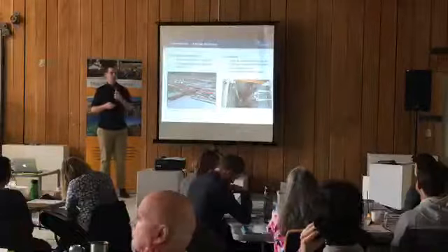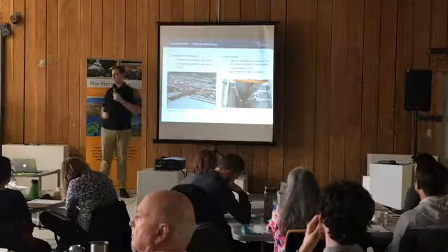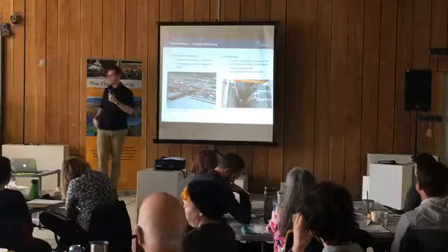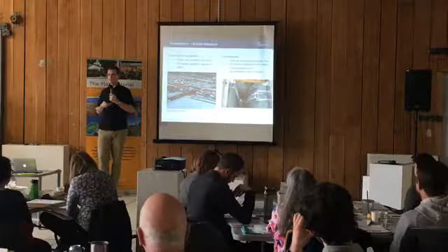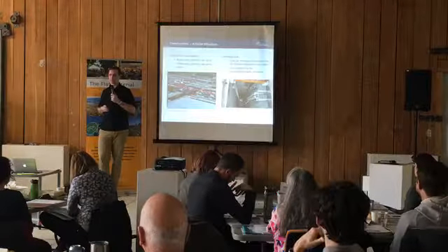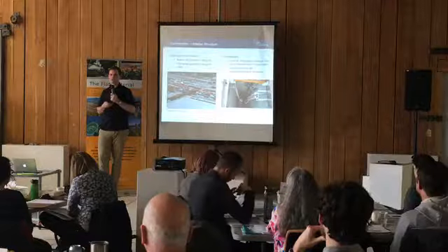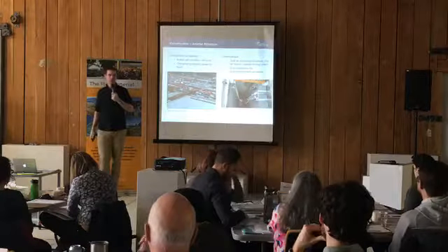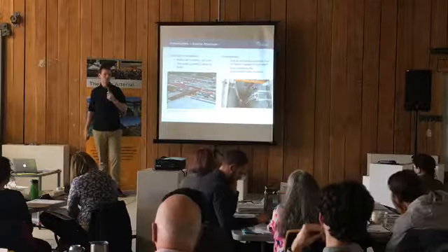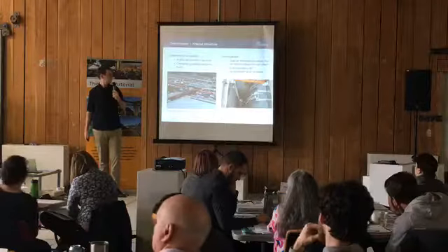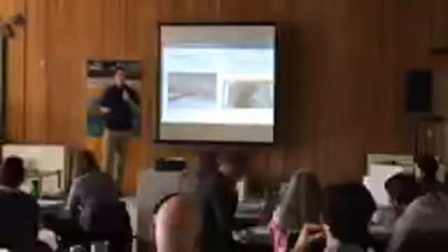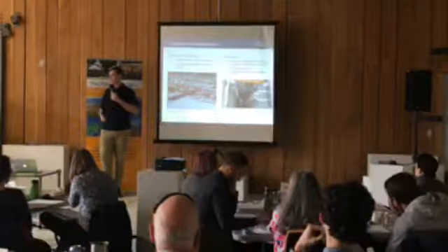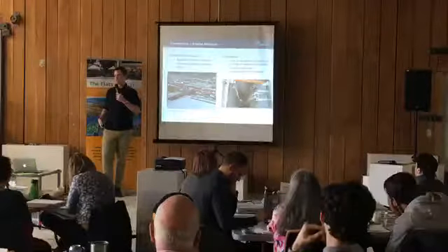Construction complexity is another key challenge. Building over an active rail yard is not a straightforward task, and there's a number of challenges there in terms of coordination with the railway to ensure that operations can continue or otherwise be coordinated with construction of a new structure. Typically, overpasses are generally easier to build and coordinate than an underpass.